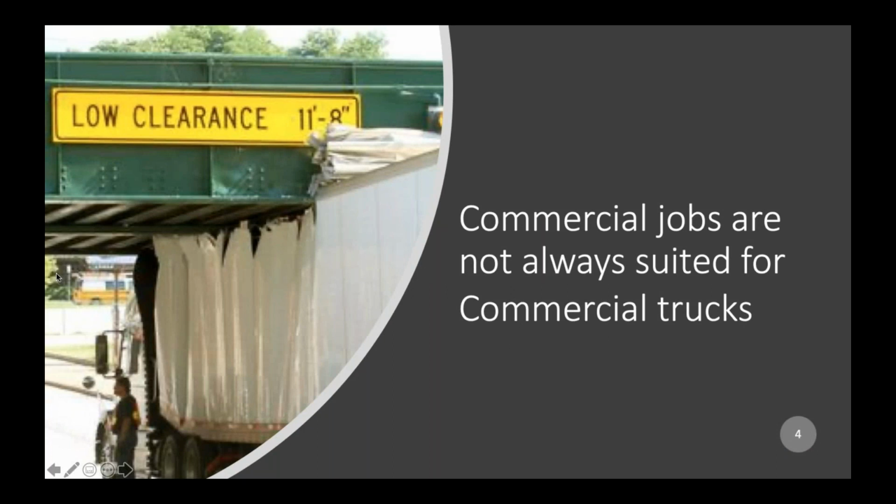You also need to tell your truck drivers as they're coming in of any unforeseens that might be there. You don't want to guide them down First Street, and First Street's got a low clearance on it, and wind up in the same situation that this gentleman is in here. Obviously, his truck was 13 foot 6 inches tall, and the bridge was 11 foot 8 inches tall.